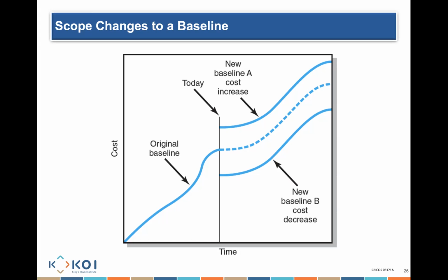Tools like Microsoft Project allow you to save a baseline based on your current data. But if your data then changes, say people ask me for more work, I can't simply compare my performance against the old budget. Microsoft Project lets me save a new baseline, which will be a new comparison I can benchmark my work against. That's why you save a new baseline, which might be more than our existing one, or might be less than our existing ones.